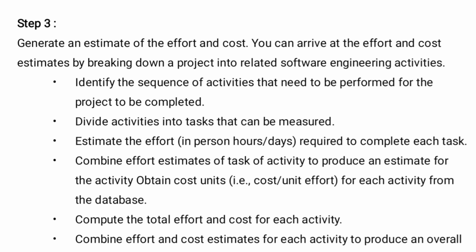Combine effort estimates of tasks of an activity to produce an estimate for the activity. Obtain the cost units for each activity from the database. Compute the total effort and cost for each activity. Combine each effort and cost estimate to produce the overall estimate.